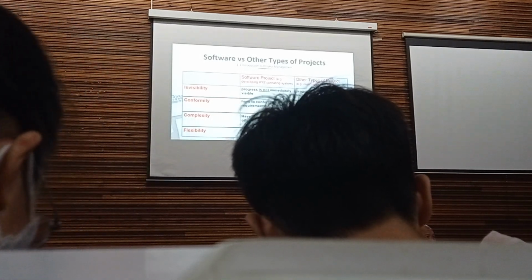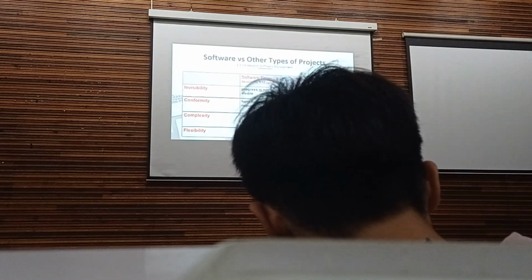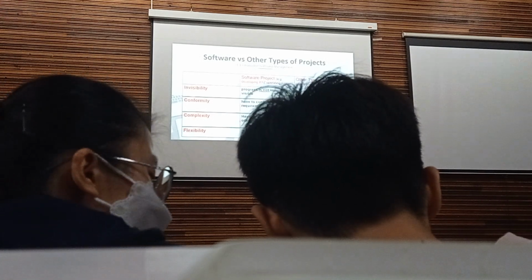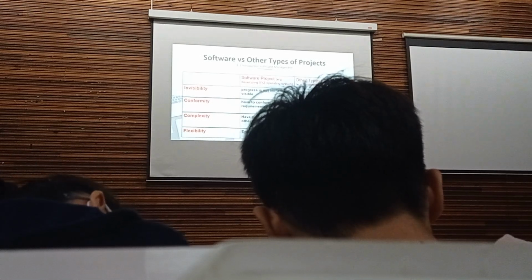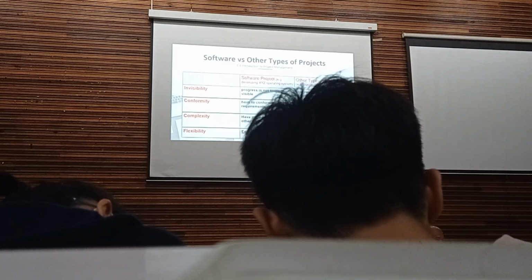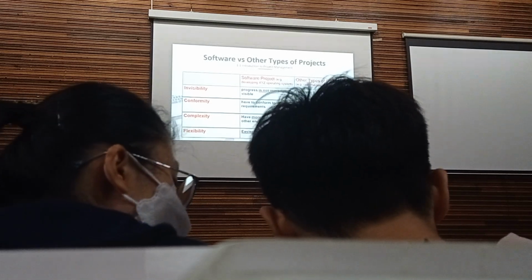So I think many people know that by comparison, a software project is easier to change compared to other projects. Therefore, very often, when a software project starts, there will be change requests coming in, because they know it can be changed.